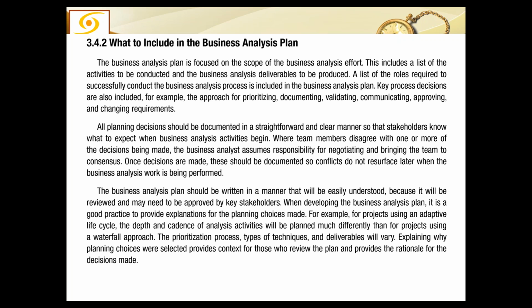All planning decisions should be documented in a straightforward and clear manner so that stakeholders know what to expect when project business analysis activities begin. Where team members disagree with one or more of the decisions being made, the business analyst assumes responsibility for negotiating and bringing the team to consensus. Once decisions are made, these should be documented so conflicts do not resurface later when the business analysis work is being performed. So when we are outlining this plan, we must mutually agree. The stakeholders and the team members should be mutually agreeing on the approach, and if there is a conflict, it is the responsibility of the business analyst to ensure that there is no conflict remaining. All conflicts must be resolved.